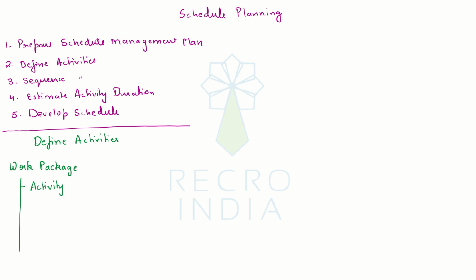Now, because this would be a very detailed breakdown, as if you remember, a work package is already a very small deliverable, and now we want to break it down into activities. So, it is recommended that generally the team members who are going to perform the work should be involved in the breakdown of these work packages into their respective activities.